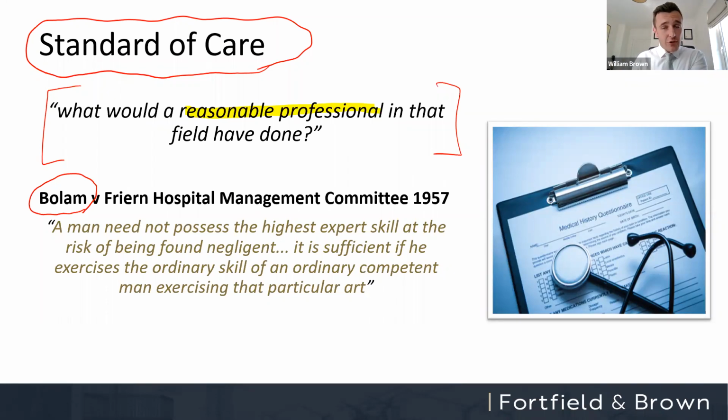So when you're reviewing your own consultancy appointments, always make sure that that turn of phrase is there, that you're required to carry out the works of the design using reasonable skill and care. You cannot guarantee that it will be done perfectly. You can only guarantee that it's done to that standard of care.